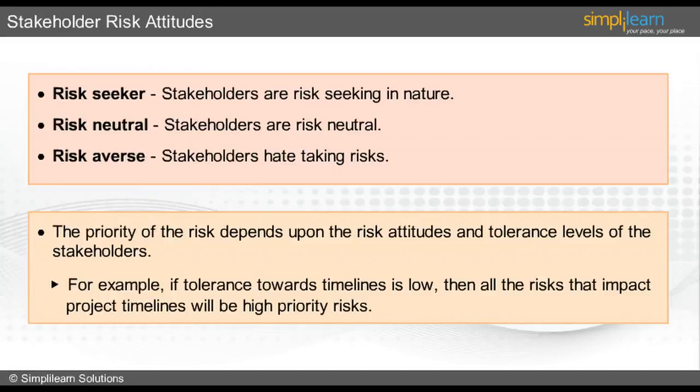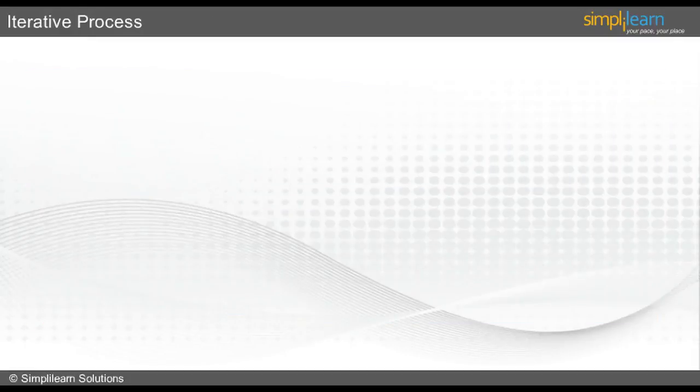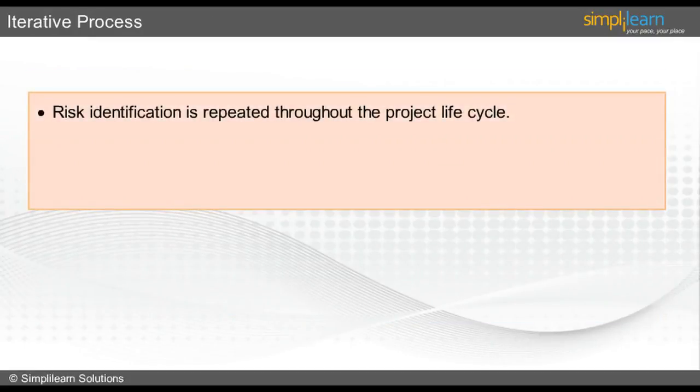Risk management is not a one-time activity. The identification and the overall risk management plan changes based on the dynamism. Usually, the amount of information available about risks will increase eventually. Some risks may occur while the others may not. New risks arise and the characteristics of the existing ones may change. Therefore, the project risk management process should be repeated, and the plans must be progressively elaborated throughout the lifetime of the project.